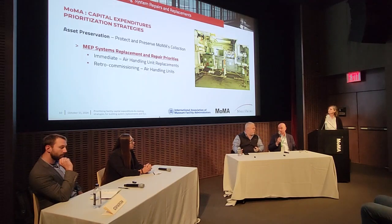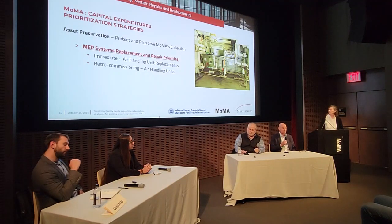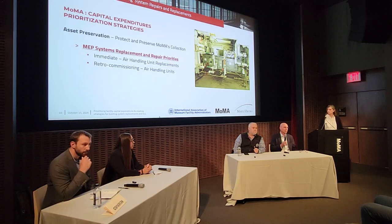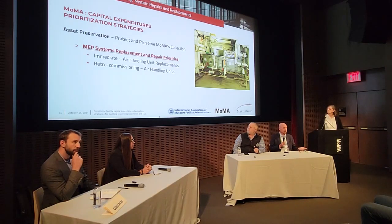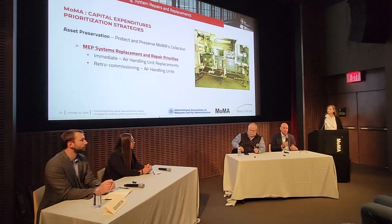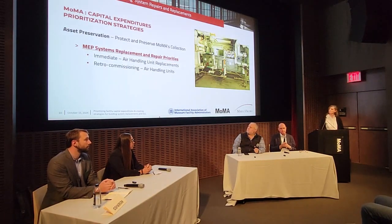Thanks, Joe. And it was valuable for us because we only have the capacity to do so much at a given time. We knew these units, the air handling units, were approaching their useful extended life. But we knew that they would probably be good for a couple more years with some refurbishment. So this plan identified these issues, but also gave us the time and space and bandwidth to pursue them over a longer period of time, hire a consulting engineer, and really take a deeper dive into these systems rather than just replacing them as an ad hoc measure.